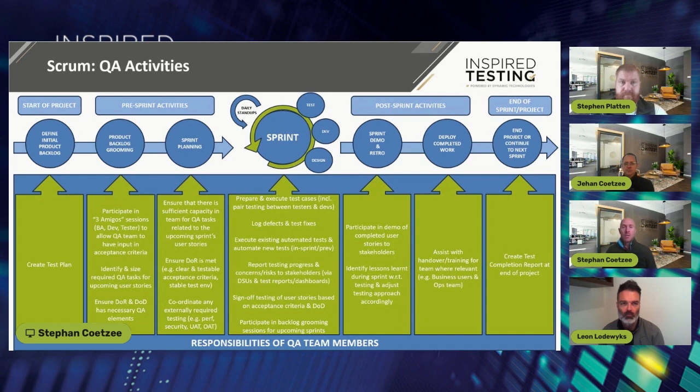They investigate what it is. Sometimes it's a quick fix that's resolved within 5 minutes. But if it's a massive thing, then we need to get the business involved and say, okay, we leave it in the backlog, or maybe it's a lot of work, but it is still critical for the sprint to be complete because it's found in a critical feature. So I think it's important that things get addressed quickly, or at least assessed quickly, so that you can understand whether it should be in the backlog or whether it should be pulled in.